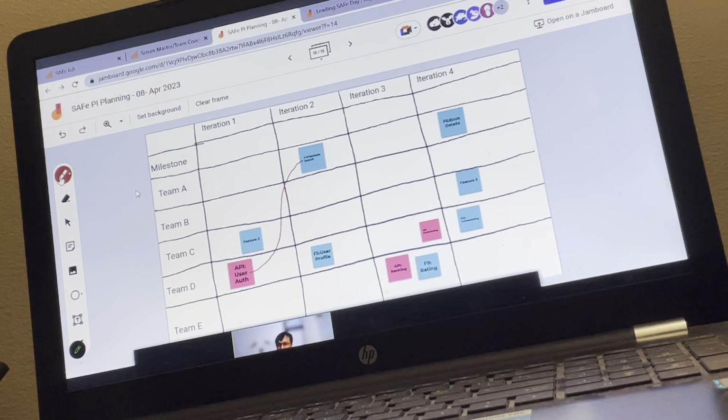It can be built incrementally, the ART planning board, but you see that each team is making their independent board. But if they don't have an integration at a dependency level, then we will find it difficult to integrate towards the end. So the ART planning board helps us in visualizing features and dependencies and relationships against the timeline.